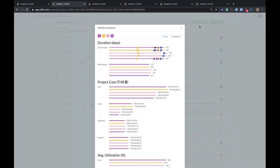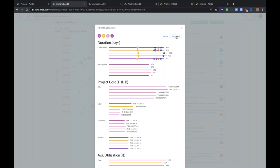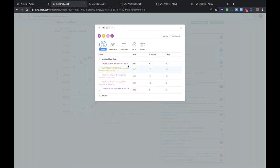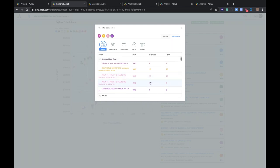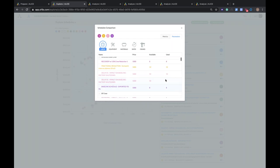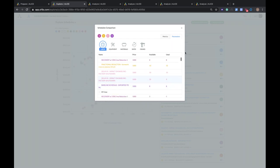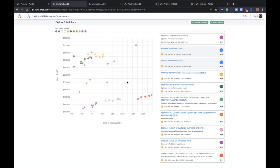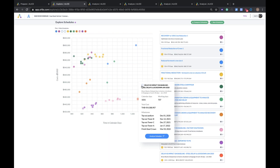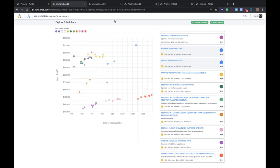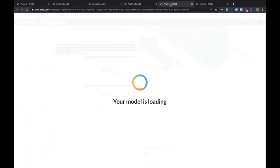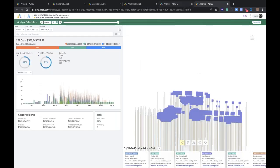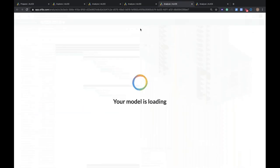Then in green, we see the first impact, the shutdown of the factory. The way that we modeled this in ALICE was that we actually just put in 30 days of lag for the brace beams, which were the materials that were impacted. So this was a quick change and then a five-minute schedule run. ALICE automatically reshuffled and resequenced your crews and gave you a best case and a worst case scenario. You have multiple plans and you can compare what's the difference between these plans. We can actually do that now. So we see the baseline schedule here. And then in pink, is that shutdown. And now we can see how ALICE allocated those crews as well.